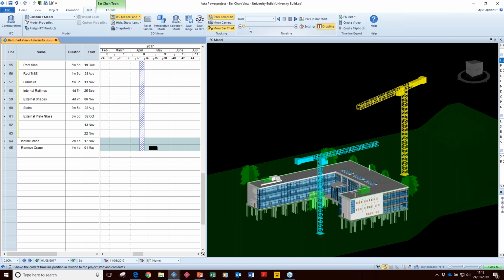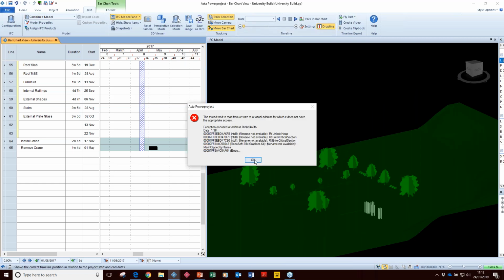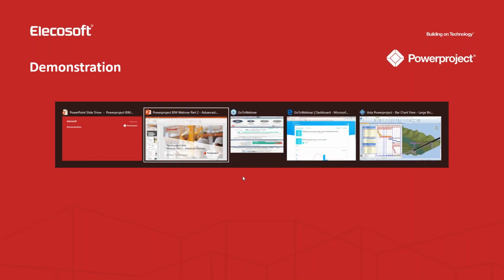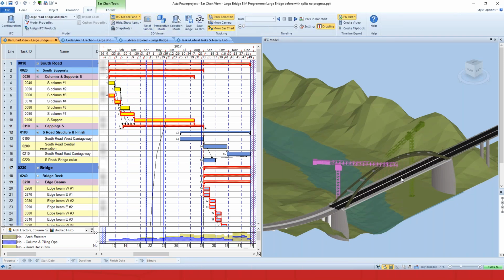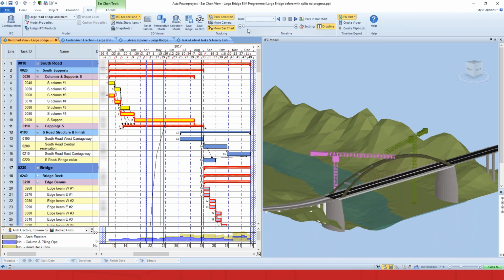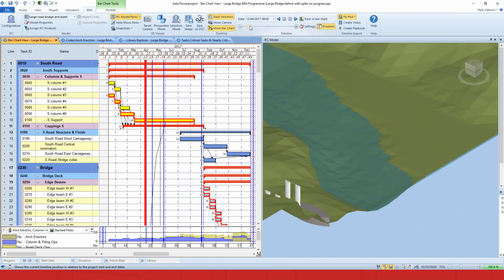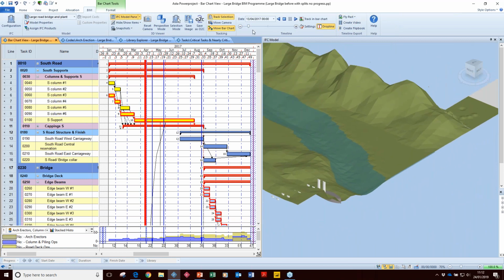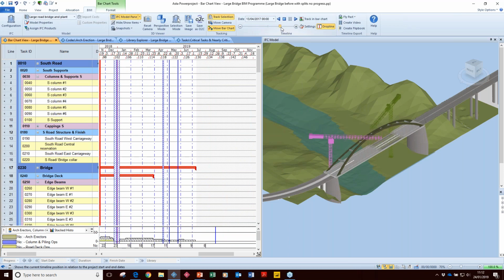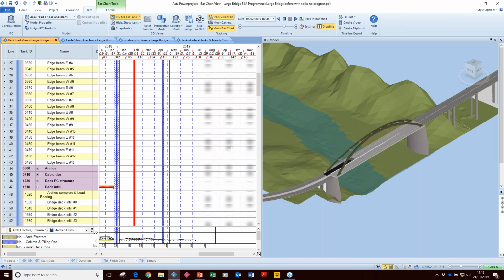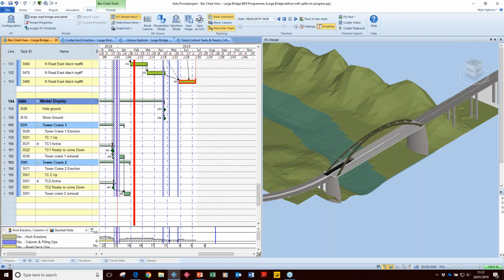So now when my timeline slides across the screen, at the beginning of the project plan, there will be no cranes on site, but when I go back into the project plan, the crane will appear. So I've actually already configured that with these two cranes in this road build. I said I might flash up the road build screen, demo. I have the same activity view here where I'm going to erect the tower cranes at a certain point in time. There's the first one going in, and then the second one at a later date. And those tower cranes do also remove once the road bed's been installed. So I can still use tasks in Powerproject to represent where it is that we're adding and removing these tower cranes.